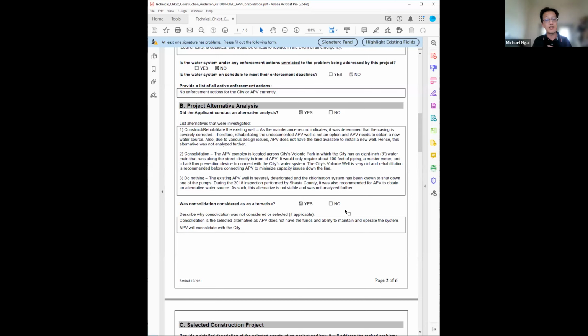Because our funding agreement is actually for 35 years. I forgot exactly. So it's the length of the agreement. We have to make sure the system is good for that amount of time, or the agreement is good for that amount of time after the project is built. So we have to make sure all this cost is considered around that period too, when we do our analysis.